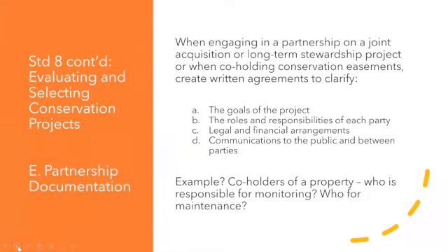And finally, closing out Standard 8 is a practice that is focused on protection partnerships and collaborations, and basically sets forth some areas that should be clarified and documented to ensure that there's sound protection of the land and avoid disagreements and dysfunction after closing. So, some of those concepts might include the details of the project, setting that forth in a partnership agreement. Maybe setting forth who's financially responsible for project costs and who's financially responsible for stewardship and management after the project is done.